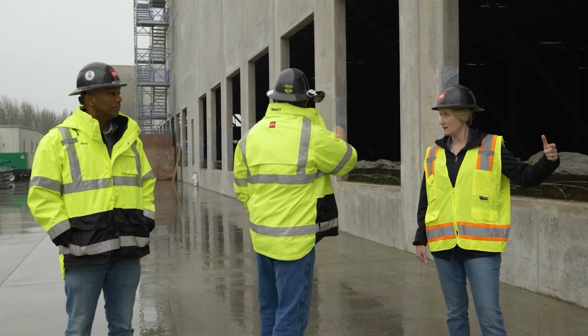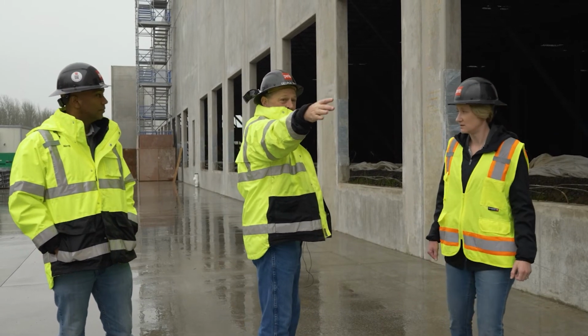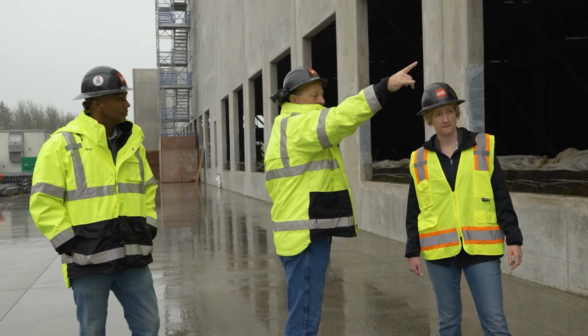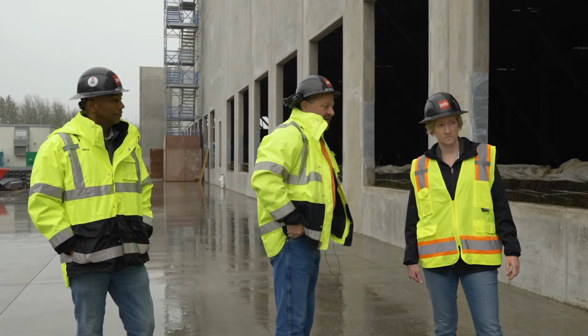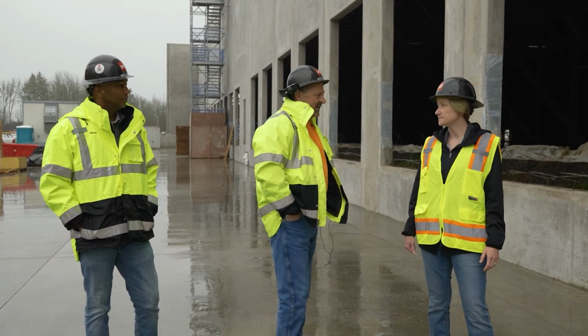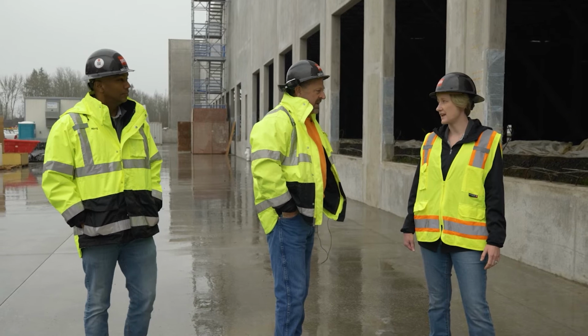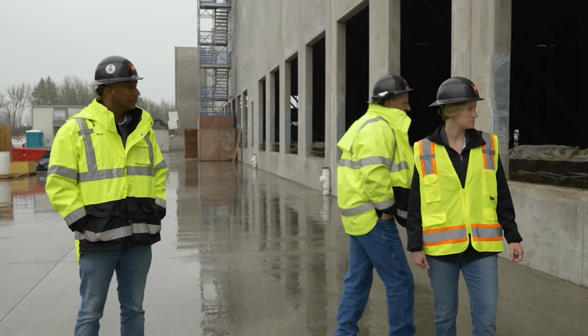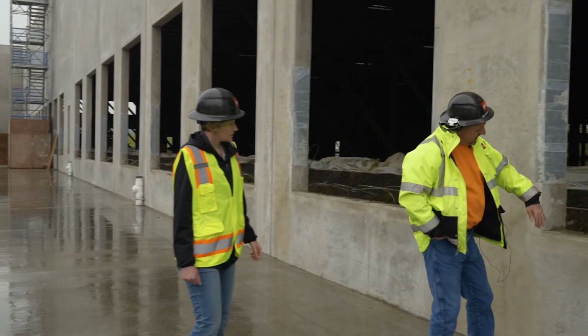I'm not going to pour any of the docks all the way down. I'm going to go to the drive-through doors on each end and just pour the short side of the building until a couple months from now. And if Specht gets a tenant, then we could put dock levelers in and do all that. And if we do dock levelers, you've got to cut this piece out,